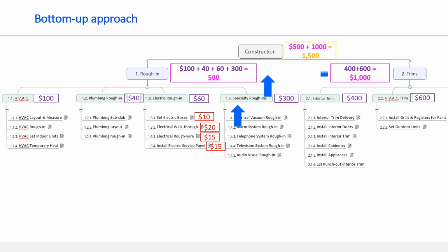It's the same approach adopted to do cost estimation as well. We start everything from the bottom and move towards the top. So it's called bottom-up estimation. There may be occasions where you do project estimation using the top-down approach, where from a high-level project plan, you divide it into multiple control accounts. And from there, you divide them into multiple work packages and the work packages into activities. On other occasions, you may have to approach the project from the activity level, that is the bottom-up approach.